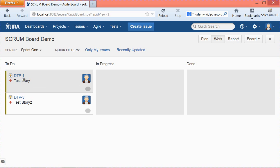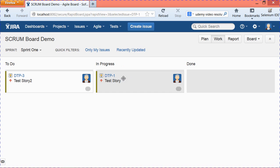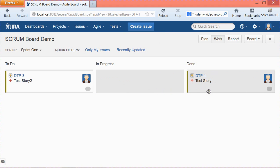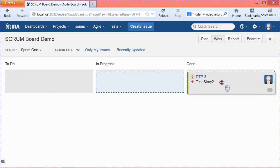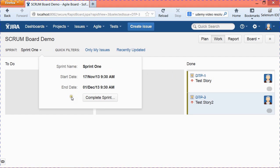Once you begin working on user stories, you can change the status to In Progress, which moves them to the In Progress column, or you can directly drag and drop them there. Once DTP-1 is finished and the assignee marks it as done, they can drag it into Done or change the status to Done and it will automatically move to the Done section. Similarly, once all stories are in Done and nothing remains in progress, you can complete the sprint.